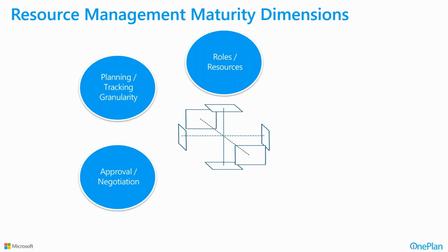And then there's a concept of approval and negotiation. Do we, in a matrixed organization, have to submit, say, here's what I need. I need a business analyst. And do I have to go to the organization that manages those business analyst resources, and they get to tell me who I can have for that period of time for this particular project or initiative? Do I have the ability to accept or reject the particular nomination of that person? These are the types of things where an organization requires process rigor and some process maturity in order to make that work well.